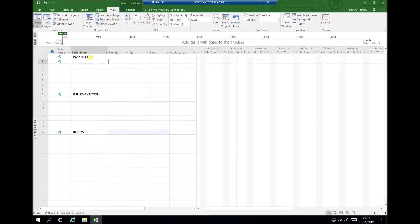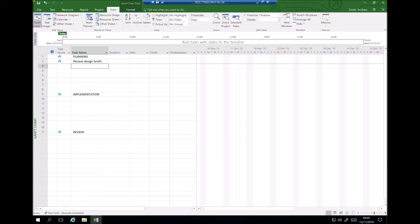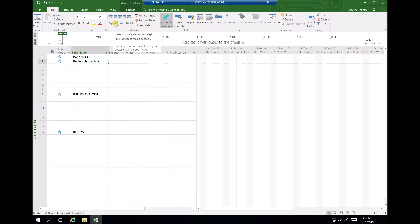Within our planning tasks, the first thing we're going to do is review a number of design briefs. From the HNC project unit, you'll be issued with design briefs and carry out an evaluation to determine which project to take forward. As this task is part of the planning process, we can indent it so that it sits within our planning task. We click on 'Task' in the top menu and select 'Indent Task' to make review design briefs a subtask.